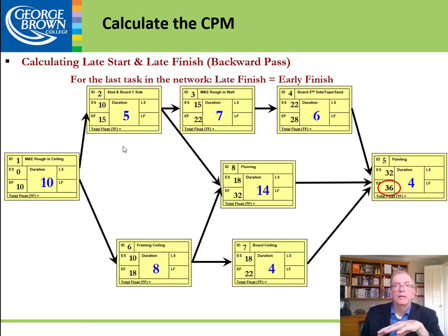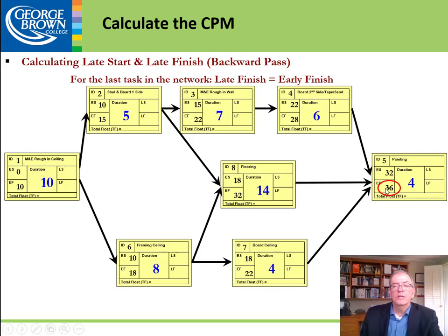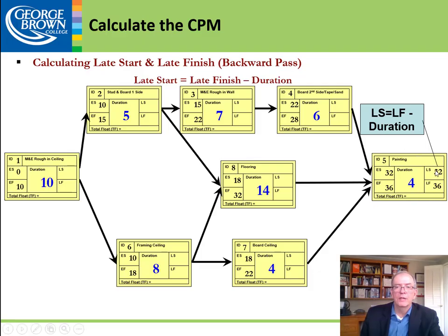Once the forward pass is done, we do the backward pass. With the backward pass complete we can figure out which activities are on the critical path — the ones with zero float — and how much float the other activities have. The last activity is 36 days, which must be on the critical path, so 36 becomes the late finish. We then work backwards with subtraction — the forward pass is addition, the backward pass is subtraction. So 36 minus 4 gives us 32, the latest this activity can start.